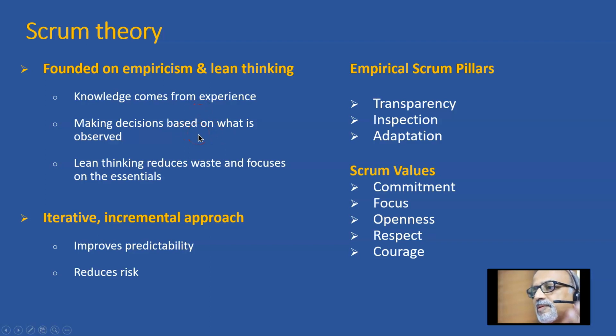That means at the end of every sprint, there is a sprint review. Lessons learned is there. And we plan the subsequent sprint based on the learnings from the previous sprint. And whatever can add value to a sprint, we incorporate, and whatever is not adding value, we are constantly driving to eliminate it.